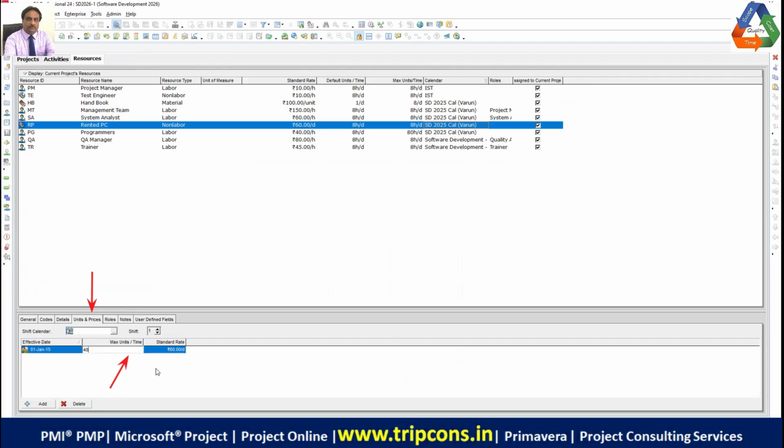So in the world of project management, we count the capacity of a resource in man hours or machine hours. So in fact, you will be writing a note, but not right now, for the sake of brevity, we have done that once. We should keep in mind that each time we are enhancing the capacity of the resource to greater than one, we must write a note, because, guys, I'm asking you a question. Can you use a resource without someone's permission in your organization? No, you need a permission. That permission will basically come in the form of an approval email. In real life, you will paste a copy into the notes tab, right?